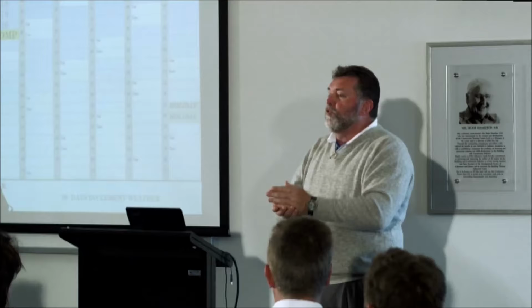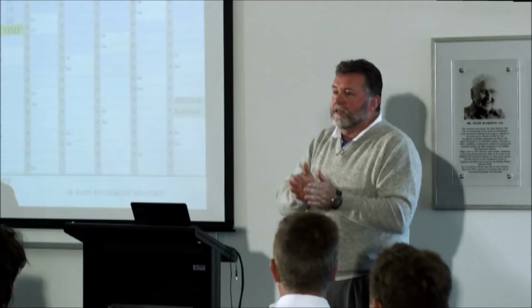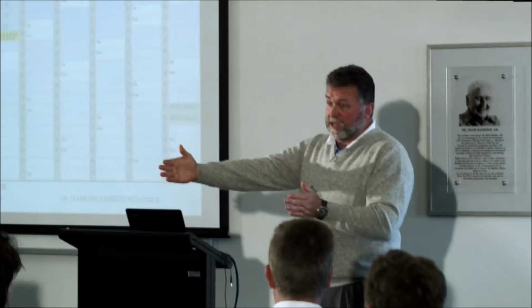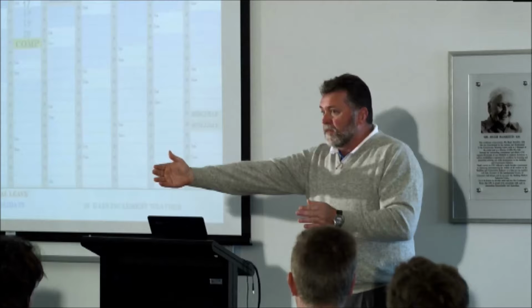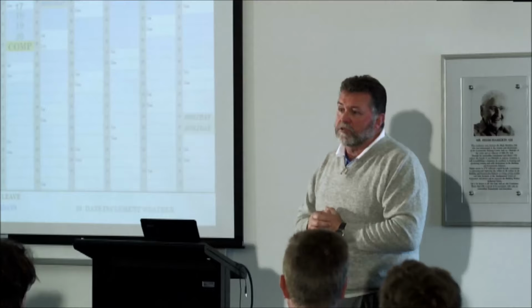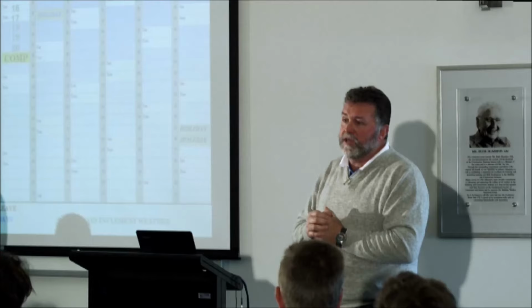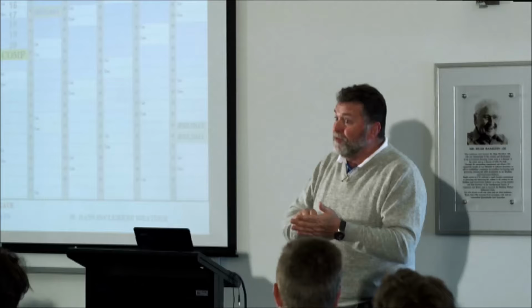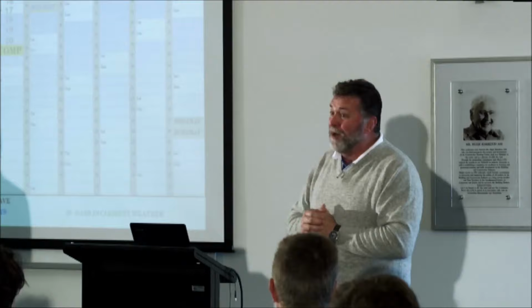If you fail to give the document, say by a few days, Paul is correct. Your cooling off period will start when you give it to them. So now you've delayed your start, for a start. If it's, for example, you give it to them at the end, or even say at the frame stage, the owner can actually terminate the contract. Now you've got a world of pain. Don't do that. You're in breach. That's why if you have a look at most contracts, most of the contracts actually have an idiot sheet part which says, have you given the owner a contract information statement? Tick yes or no. It's a no-brainer.